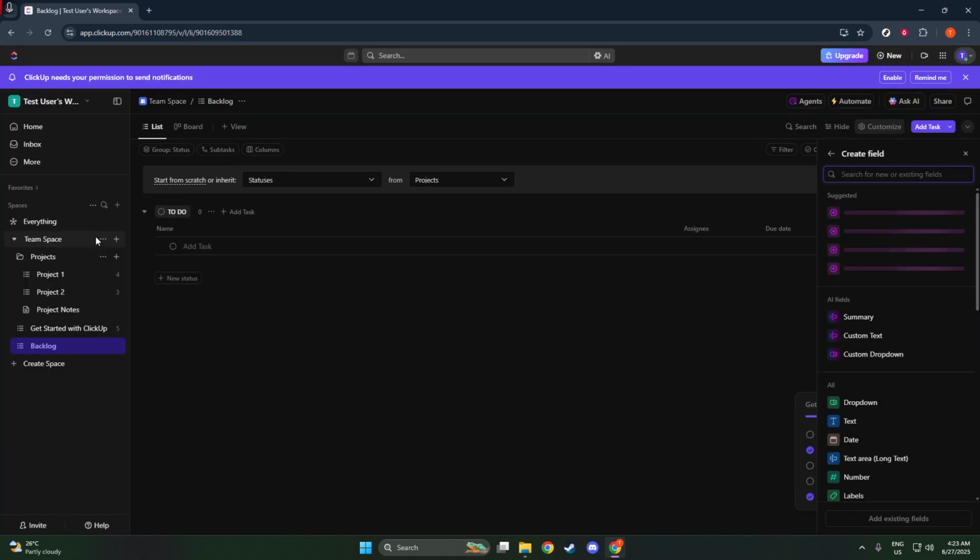You'll want to organize your task statuses. Common examples are backlog, ready, in progress, and done. These help in easily tracking where tasks are in the workflow pipeline. In addition to statuses, you have custom fields at your disposal. Consider adding fields like priority, estimated effort, or story points. These fields allow for a more nuanced understanding of the tasks ahead, helping you and your team prioritize what needs to be tackled first.